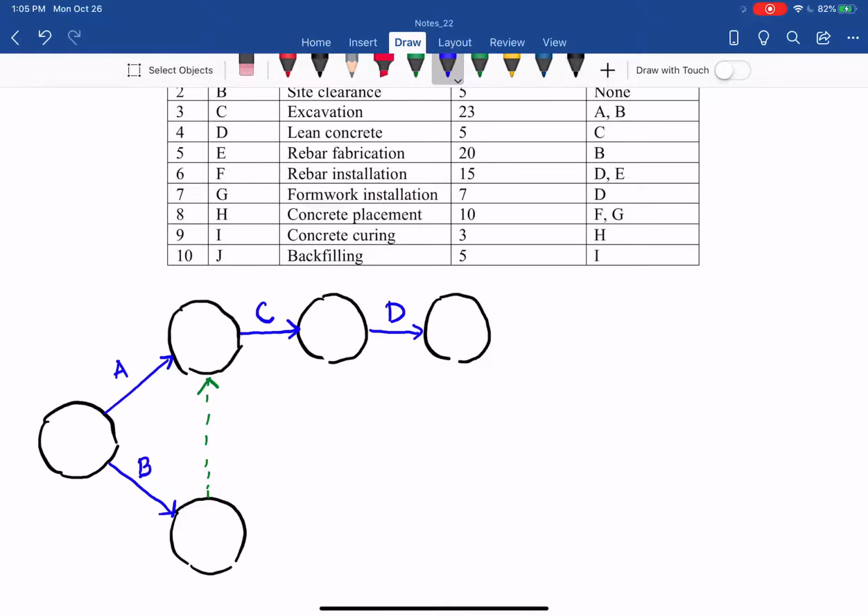So it's the same. So we have D follow C. B follow C. And then E follow B. Then we can now do that. E follow B here. Only follow B, not A. Then I can have that one E. And then check. E follow B, perfect. E does not follow A because the dummy arrow does not get into the beginning node of E, as you can see there. So that is good for E only follow B, not follow A, based on the direction of that